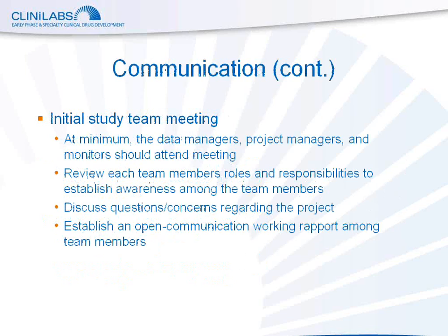One item to do and/or encourage, whether it's a paper or an EDC study, is to bring the study team together once they are identified. At minimum, the data managers, project managers, and monitors should attend this meeting. This is a good time to review the roles and responsibilities so everybody is aware not only of their own responsibilities, but the other team members' responsibilities as well.